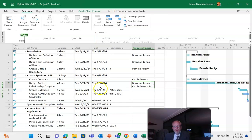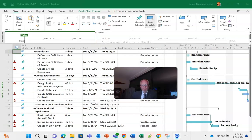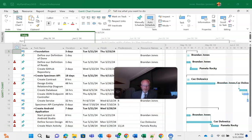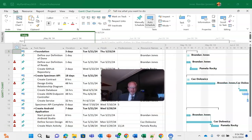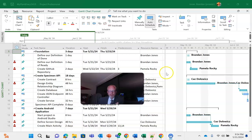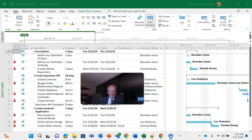Now notice a few things. First of all, when I assign resources to each of these work units we see the resource name here over to the right. Now when I designed this project I had all of these big summary tasks starting effectively the first day, but now we're going to see that's not practical because we have some resources who are bottlenecked. There's some resources who are over-allocated.